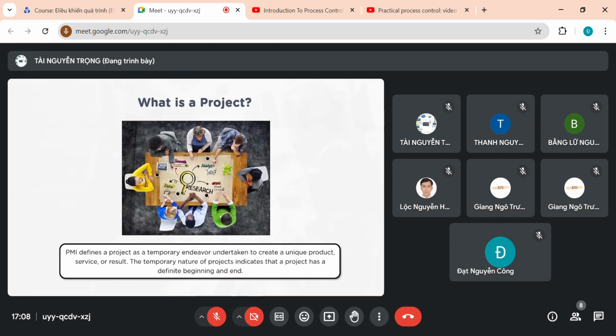Now next, planning. As we have a basic understanding that yes, this project has to be done, and a discussion with the key stakeholders has happened, it now moves towards planning. In planning, one will understand the project in its entirety. If it is a waterfall approach, one has to have a clear articulation of the entire project, with comprehensive details and a holistic approach. If you are going in an agile way, then in planning you may have a big skeleton. As you go through each iteration, you go deep into detailed planning.